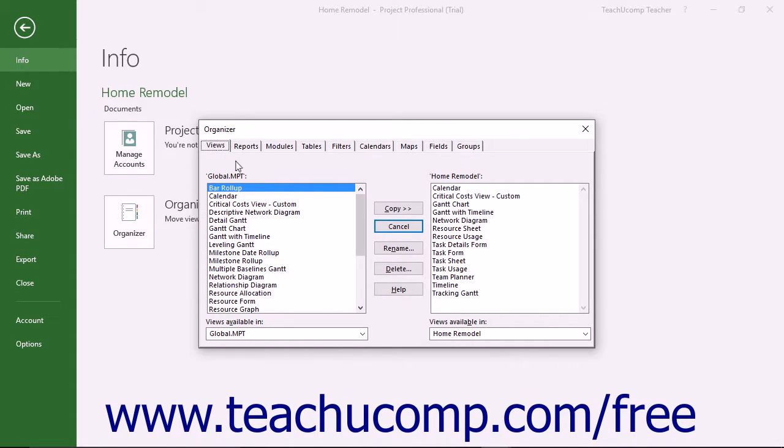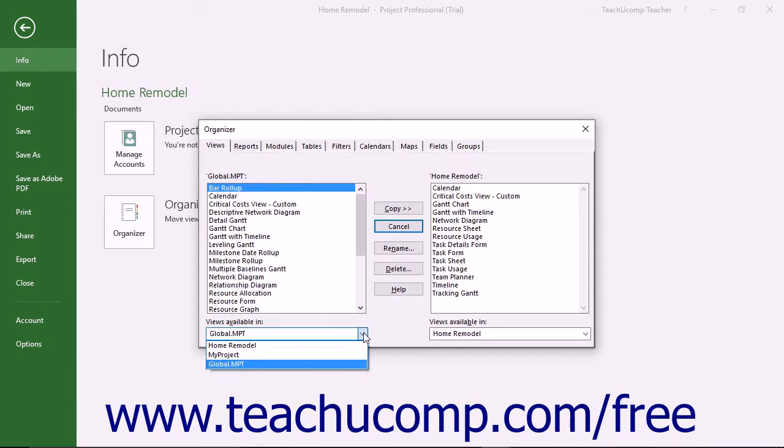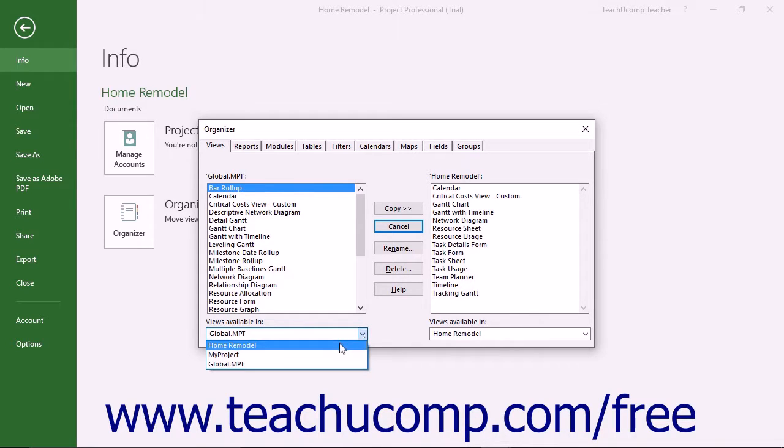Then use the left Object Name Available In dropdown to select the name of the project file that contains the specific object to export to another opened project file.